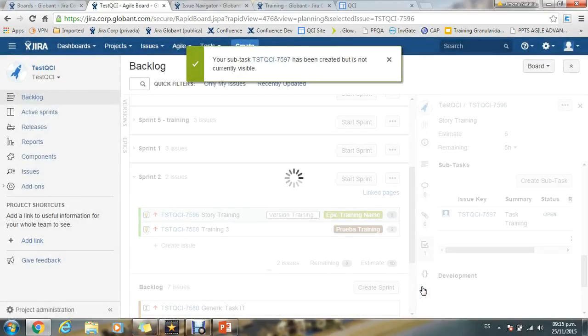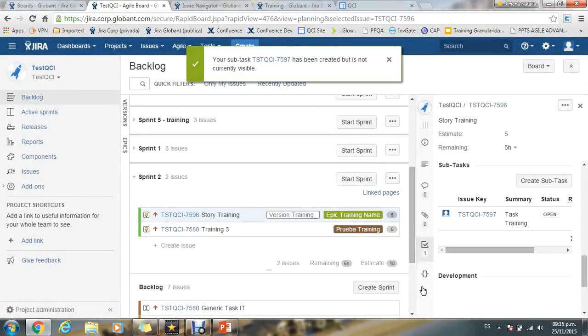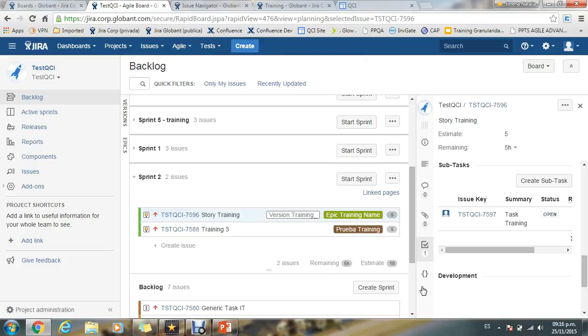From the processes area, we propose as a good practice to think in tasks that won't consume more than 8 hours because the advance of those tasks is easier to control and monitor. Remember, if we don't estimate all the tasks, when the sprint starts, the tool will generate the reports with incomplete information.